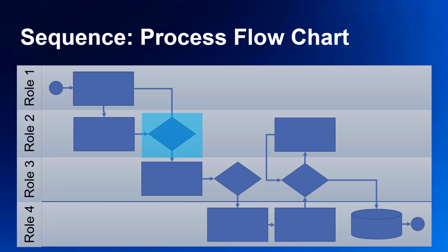Decision diamonds may indicate bottlenecks or rework where activities are often delayed by another party's decision or corrections. We may find potentially inefficient loops involving multiple decisions, rework, and redundant processes. This type of cross-functional flowchart is often used to try out new sequences or quality control checkpoints for process improvement.